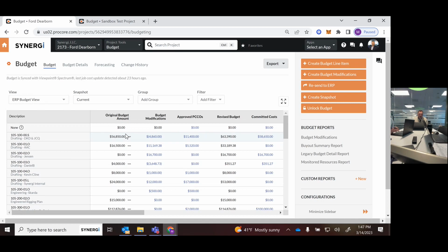You're saying, all right, what do you have for drafting? 16,500. How did you get to that number? Did somebody give you a quote? Is that an internal number? If so, how many hours were you figuring for that? Justifying it. It's your opportunity to basically shoot holes in our own internal estimate. Okay, so it's pretty cool.